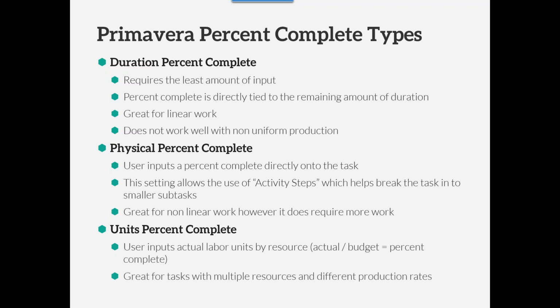percent complete helping to remove some of the subjectivity on purely a physical percent complete, on someone just randomly saying 33% complete. Units puts us back into, we have 33 widgets to install and we put in 13. And so it helps us get back into validating some of those percent completes and really validating where we are on the project.